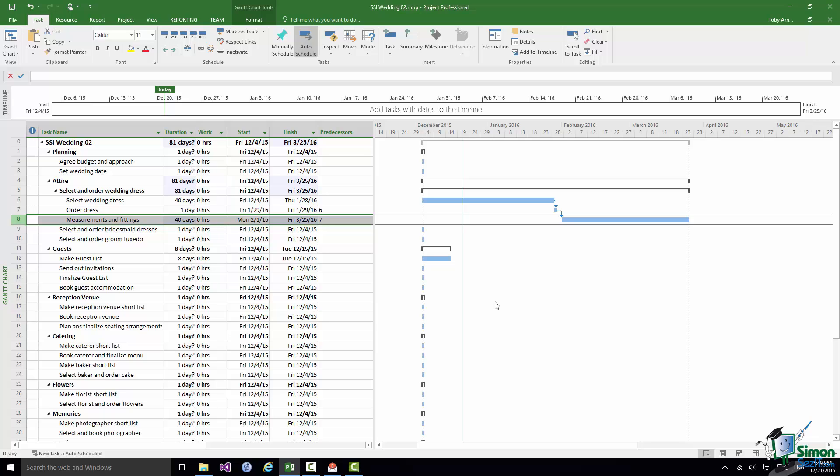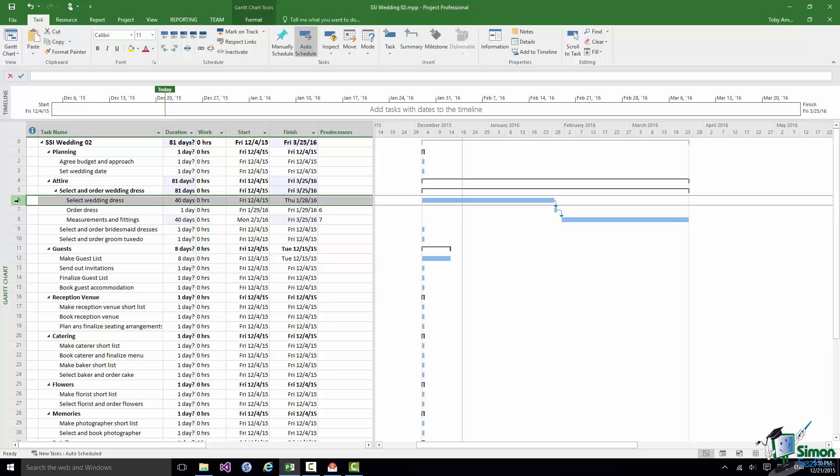So let's in this case say that the dependency is that we'll select the wedding dress before we select and order the bridesmaid dresses.